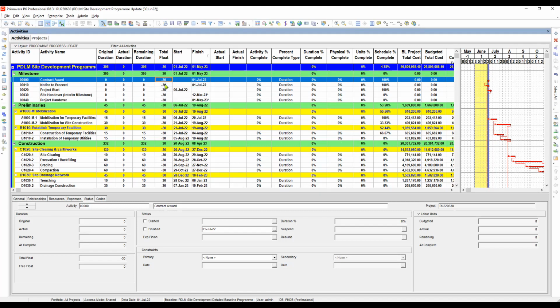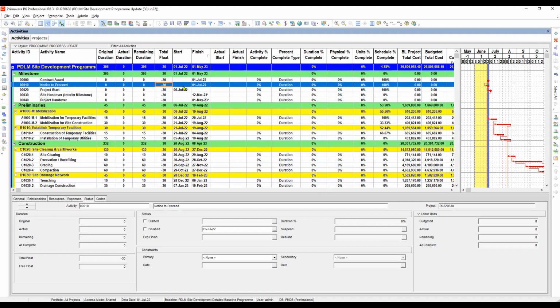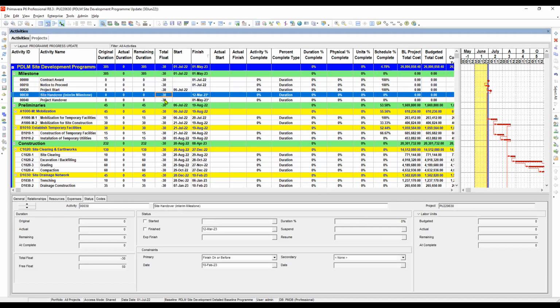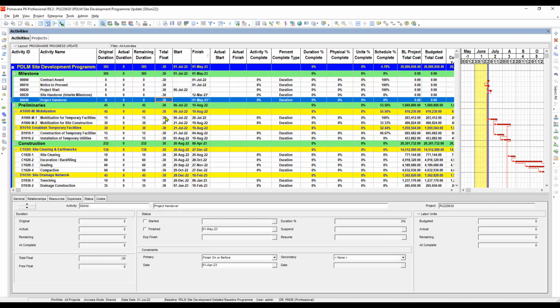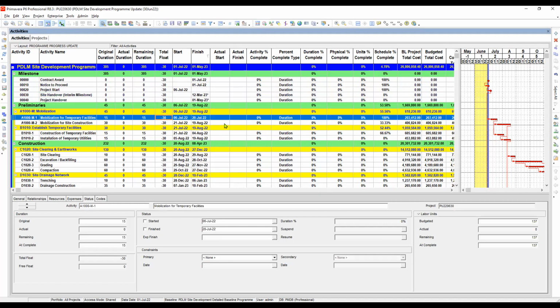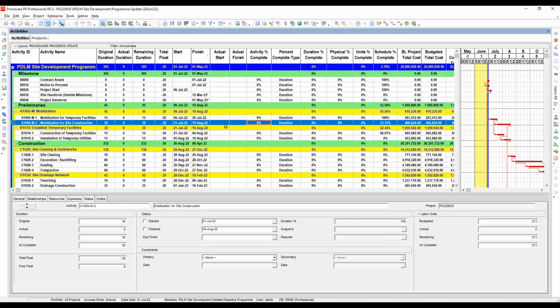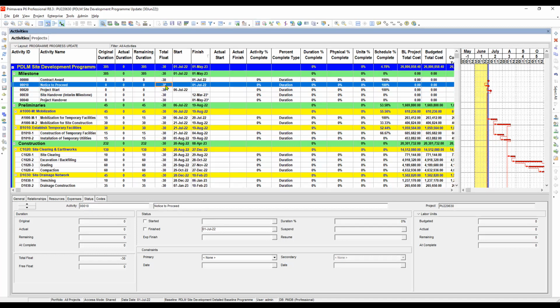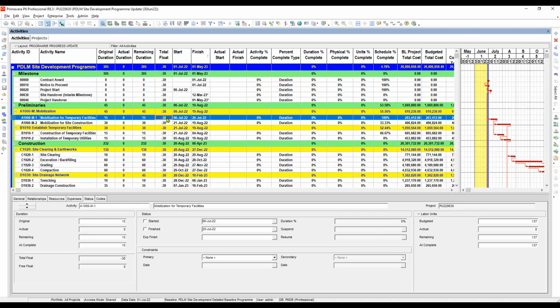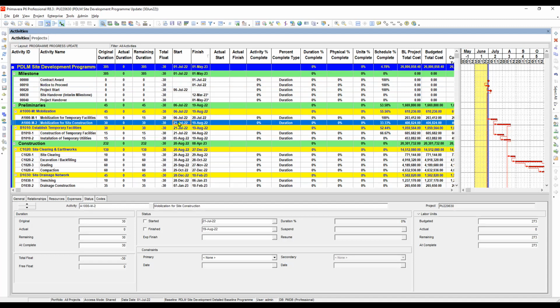It is because we moved this project schedule by 30 days without any progress being updated yet. So you can realize that once the project starts, and you have been given a number of activities to accomplish for that period, you have to do so, because if there is none, this will happen to your schedule.